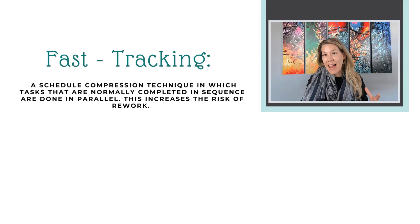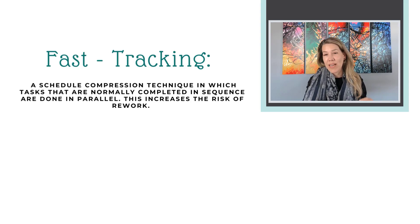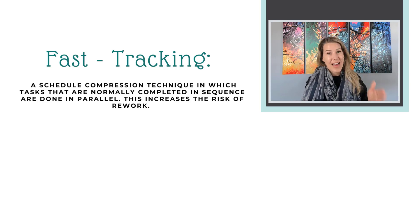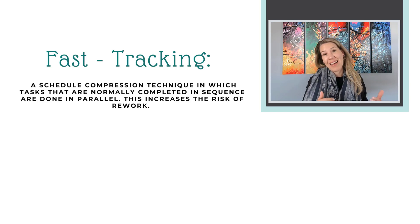The downside of using fast tracking as a schedule compression technique is that it really does increase the risk of rework. So when there are dependencies, and the ideal way to complete the work is task one completed first and then task two, if you're doing them in parallel and something changes with task one, then that may also impact task two, requiring some rework.